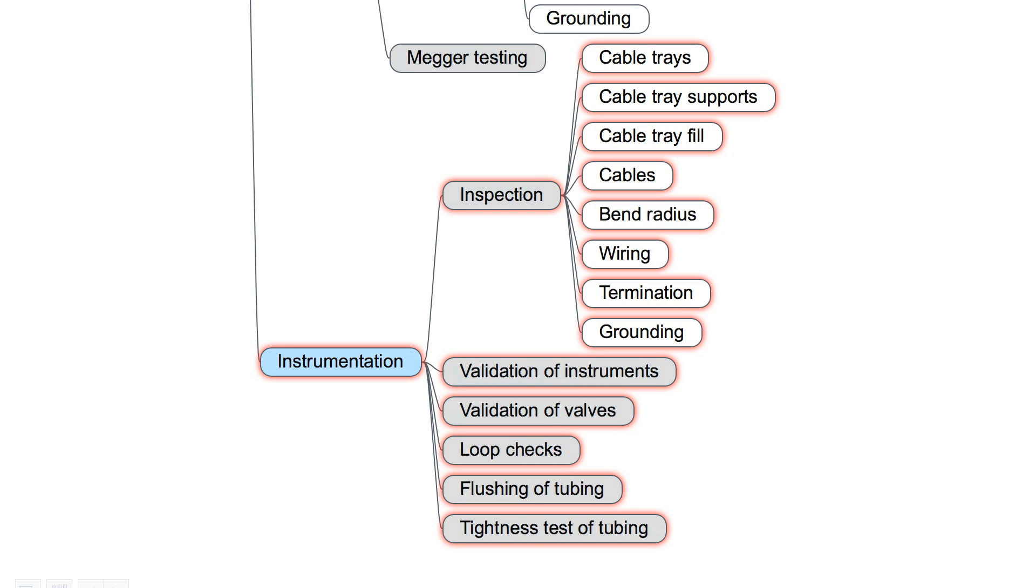Instrumentation. Inspections are similar to the electrical inspections: cable trays, cable tray supports, cable tray fill, cables, bend radius, wiring, termination and grounding. And additionally we have to validate instruments, validate the valves, loop checks have to be done, flushing of tubing, tightness test of tubing.